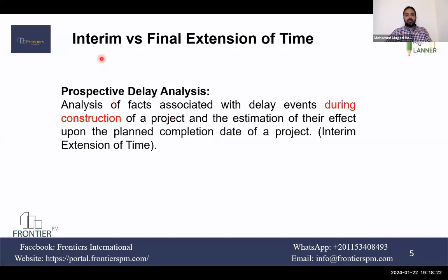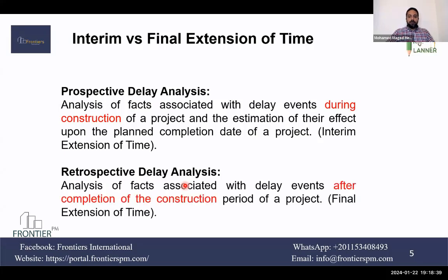So it's called here in this reference interim extension of time, as it is prospective delay analysis. It's not a common name for the prospective. The common name is the prospective delay analysis itself. The other one is the retrospective, and it is final after the completion of construction. So it comes after the fact, after the delay occurs, and also its effect happened and completed.